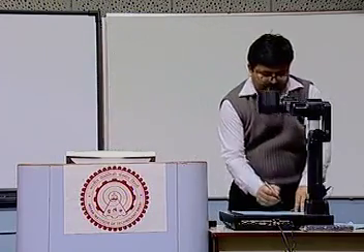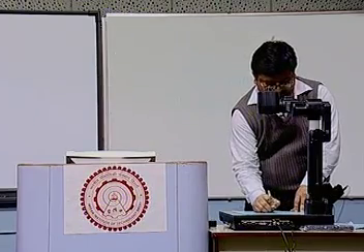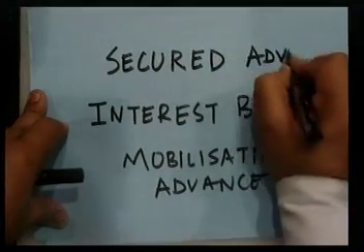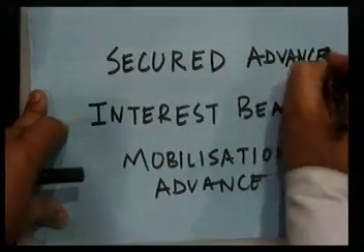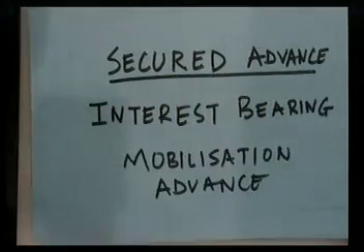Then there is a term called secured advance. What is called secured advance? Secured advance is given for procurement of material, especially non-perishable materials, right.